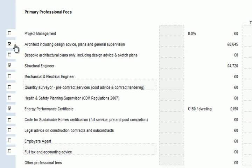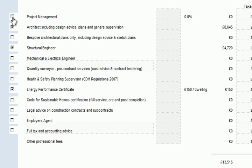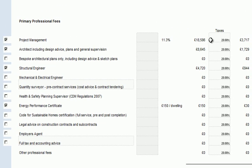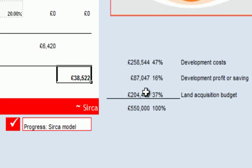The model comes predefined with some options ticked — some choices already made. This is why when you carry out a quick appraisal, some costs are already chosen for you, making it easier. But at the next stage you really do have to think about whether these costs are appropriate by reference to the property and its location. For example, we may or may not want to use a project manager. If we do decide to have one, that cost will be additional and therefore the land acquisition budget will go down.